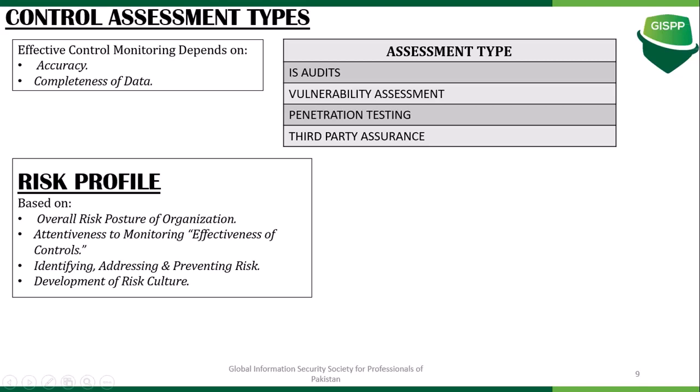Within this deliverable, you will also drill down to the tasks that you will do on a weekly basis, because the grand deadline that you have set for this deliverable is 1 month. So you would also decide what you will do every week. If you are not able to achieve your weekly tasks, it tells you how you are performing with regard to your expected KPIs. And if your expected KPIs are not being reached, your risk levels are increasing.